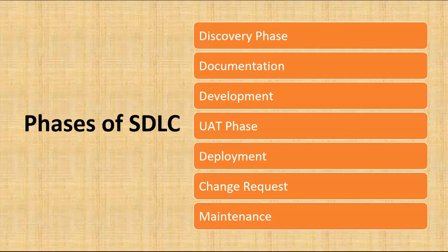In this stage we will also call one more thing, IPA. What is IPA? IPA is the initial process assessment. In the discovery phase we usually do the initial process assessment, which means we are assessing the process. Basically the SME has a manual process, and you need to understand whether it is feasible for automation or not.